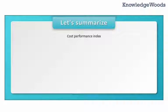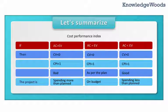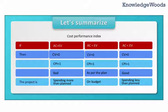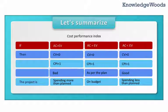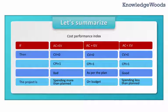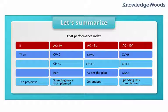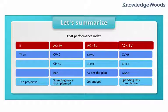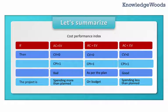Let's summarize the Cost Performance Index. There could be three situations. If actual cost is greater than earned value, cost variance is negative and CPI is less than 1 — a bad situation meaning the project is spending more than planned. If actual cost equals earned value, cost variance is 0 and CPI equals 1, meaning the project is on budget. If actual cost is less than earned value, cost variance is positive and CPI is greater than 1 — a good situation where the project is spending less than planned.